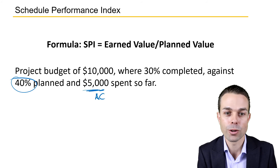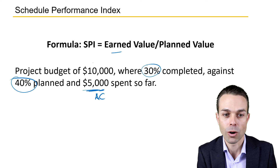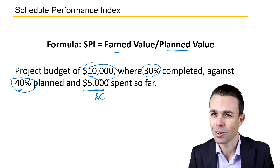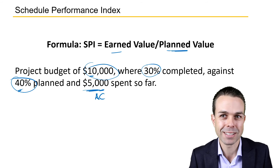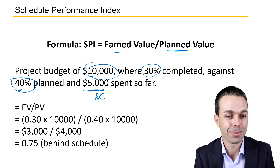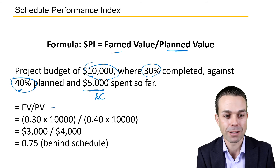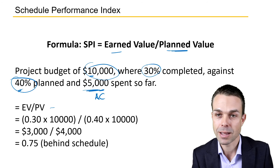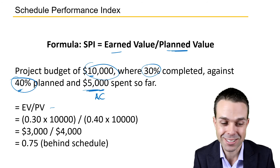Remember, it is Earned Value — our 30% of $10,000 — divided by the Planned Value, which is 40% of $10,000. We've used nice round numbers to make it a little easier. Hopefully we don't need a calculator for this one. EV divided by PV gives us 30% of $10,000 which is $3,000, and 40% of $10,000 which is $4,000.